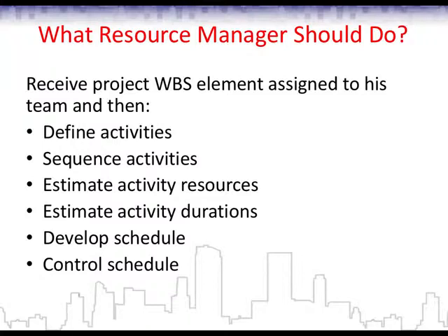And how can this be done in Microsoft Project Server? I wouldn't say that it's actually convenient, but it's possible. You can do this with master projects, but this creates a lot of overhead work for project managers to create sub-projects for all of the WBS elements, then assign them to resource managers. And